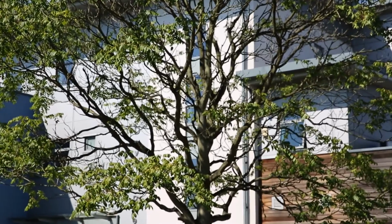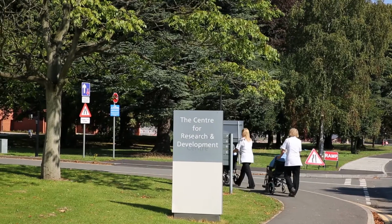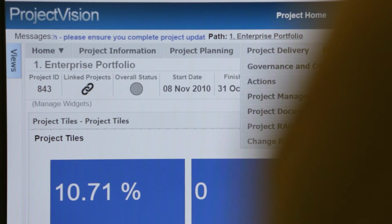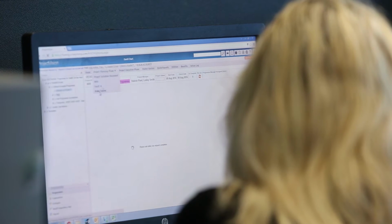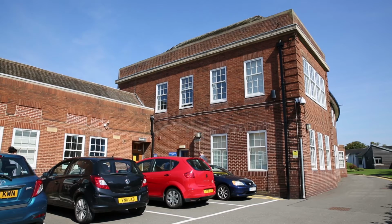Management information very traditionally has been reported at the end of a month. Sometimes 12 days into the beginning of the next month, you're looking 6 weeks backwards. With Cora systems, we are actually reporting live as things were at the end of yesterday, and that makes an enormous difference in terms of managing risk.